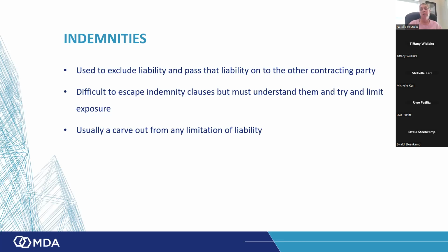What I like to do, when I get a bespoke contract, even a set of particular conditions, is search for the words indemnity and indemnify, to see if they've added any somewhere in the specifications, in the employer's requirements, or in the scope of work. It's a very severe clause for a party to take on if they don't understand the implications of it.